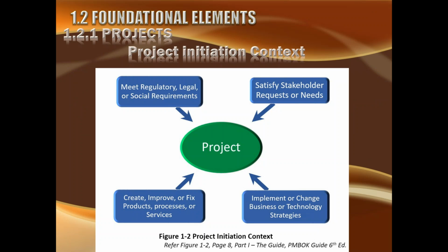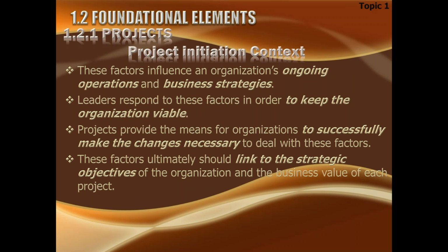So this diagram also portrays exactly the same which I was just describing. There are four different reasons why a project should be initiated: to meet some regulatory requirement, to satisfy the stakeholder need or request, to create, improve, or fix any product existing in the organization, or to implement or change business or technology strategies. So it could be from top down, it could be from bottom up, it could be from outside, it could be from legal issues or something like that. So the higher authority could have mandated that your organization should be able to do certain things.